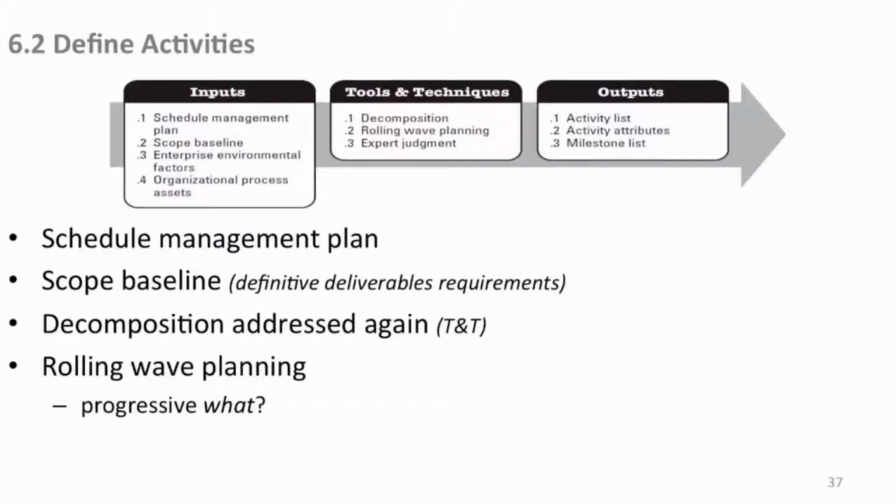And rolling wave planning, again, is at work, progressive elaboration, because even though you can schedule stuff early, you have good durations. I know it's going to take this long. Out here, we're not quite sure yet because a lot of things that happen here may impact how long it takes to finally do these up here, so you estimate it. But now as you complete these things, you look up ahead, and as they come in closer, you define them better. So then they're actually more precise, rolling wave planning.